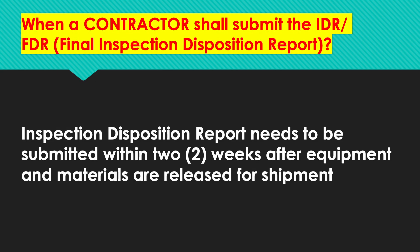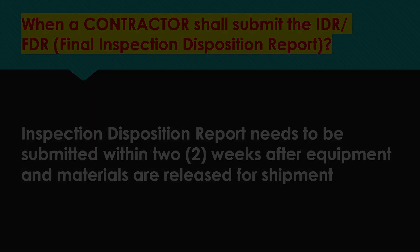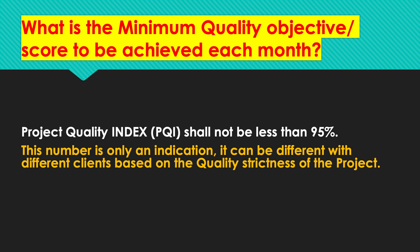When shall a contractor submit the IDR or FDR — Final Inspection Disposition Report? The IDR or FDR needs to be submitted within two weeks after equipment and materials are released for shipment. What is the minimum quality objective or score to be achieved each month? PQI shall not be less than 95% — though this number can vary by project, such as 90%, 93%, or 97%, agreed between contractor and client.